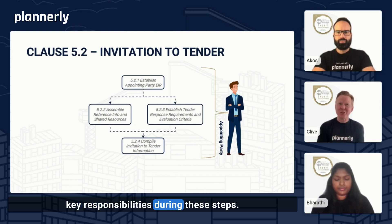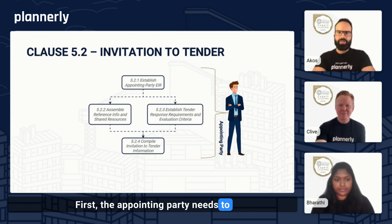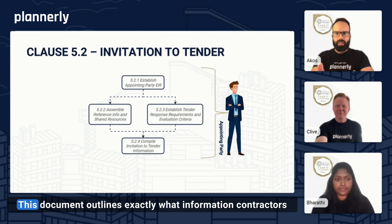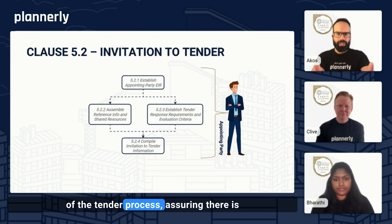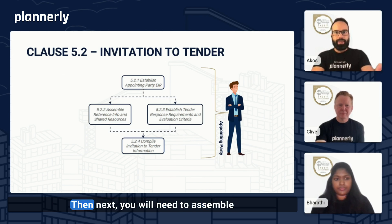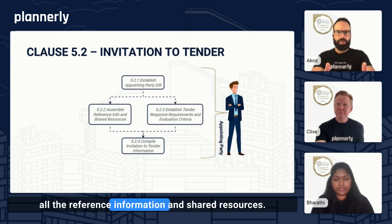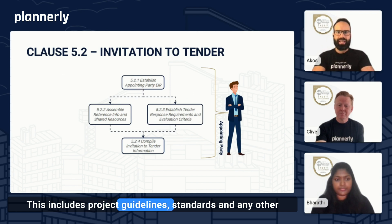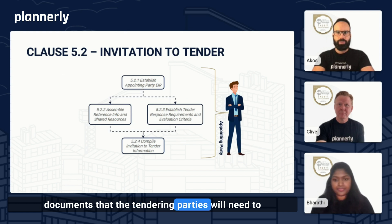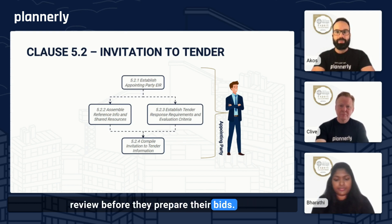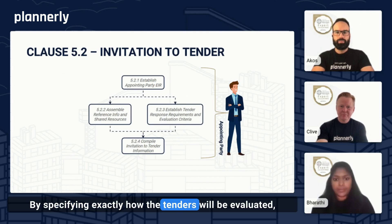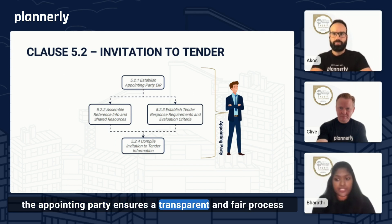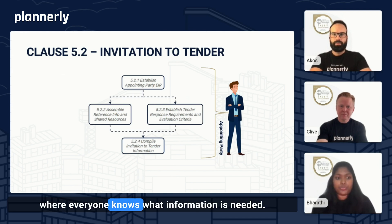Let's go through some of the key responsibilities during these steps. First, the appointing party needs to establish the exchange information requirements. This document outlines exactly what information contractors and consultants need to provide as part of the tender process, ensuring there is no confusion about what's required. Next, you'll need to assemble all the reference information and share the resources — project guidelines, standards, and any other documents that the tender parties will need to review before they prepare their bids. It's also crucial to establish clear tender response requirements and evaluation criteria, ensuring a transparent and fair process where everyone knows what information is needed.